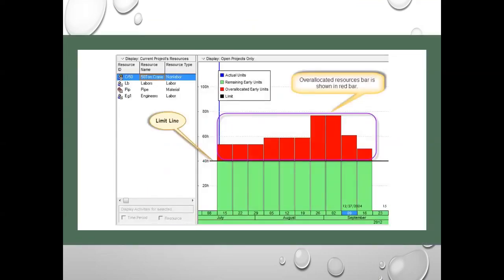This is what I call an over-allocated resource. For example, now I found the resource has a weekly distribution of 15, 20, 29, 5, 12, 19. Now you find that the resource is a 50-ton tower crane, and this 50-ton tower crane is only available 40 hours in a week, because this is 8 into 5, that is 40. That means you are working five days in a week, and this resource, the 50-ton tower crane, is available only 8 hours per day.